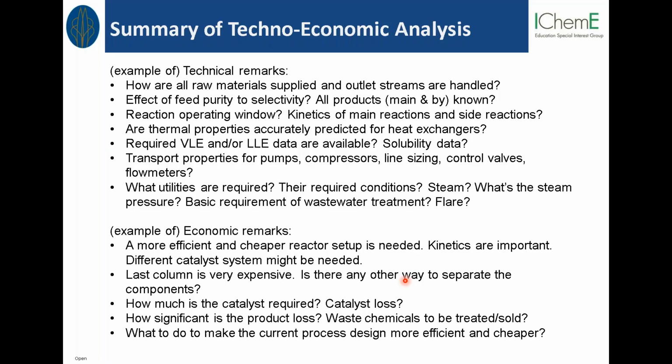But then the real chunk of the work is finding this list of questions, because this list of questions is the backbone or the strong foundation to say whether or not we have to go further with this process. If we have a long list of questions for one process, that means we are going to need more effort, a significant effort compared to the others, so for the time being we better put it in a fallback option, so to say, and we move on with the other options that have questions that we think we can handle for the next stage.